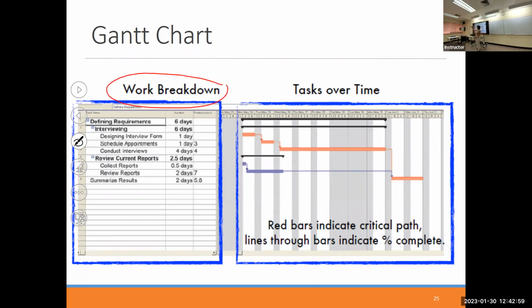Once you know that your project needs this work, you can group the project, sub-project or module of the project, the task and the subtask and then the activity and so on. You can group and indent them and then you can better estimate the time it takes for each of the small activities.